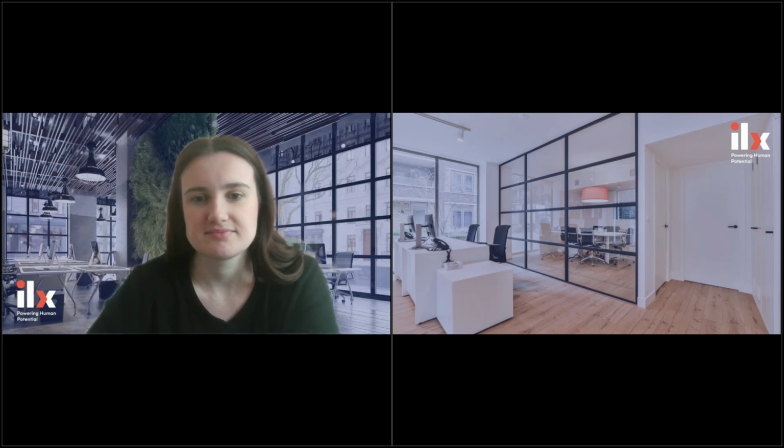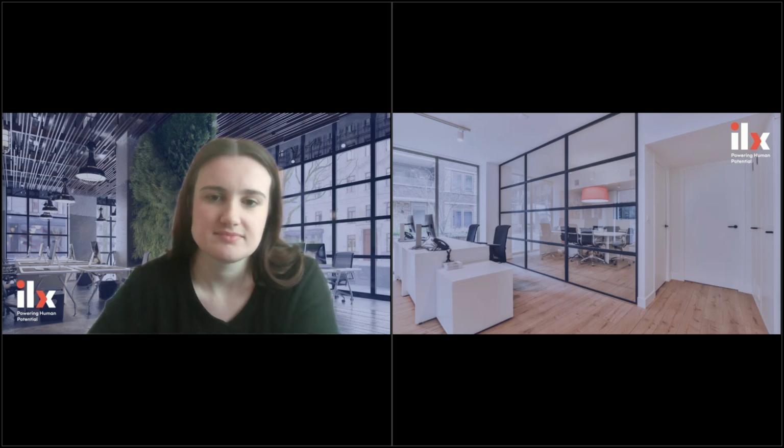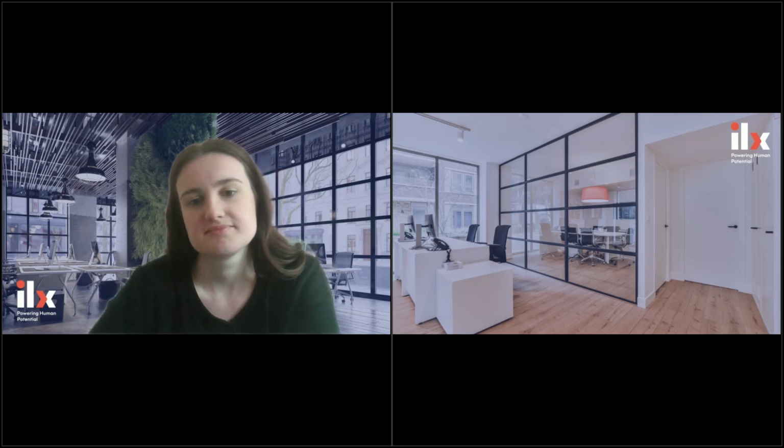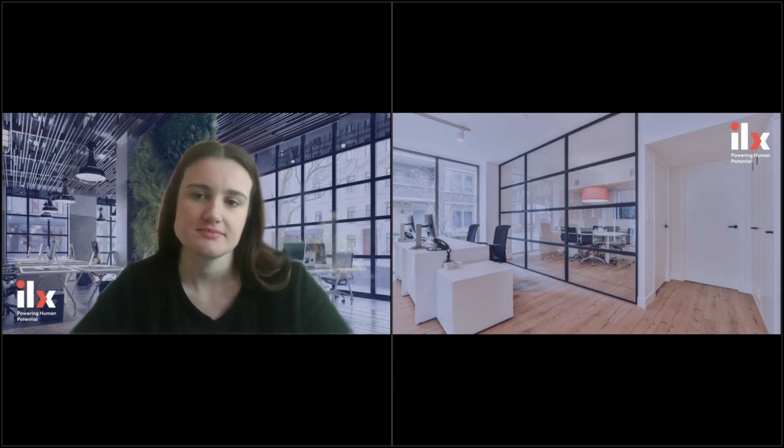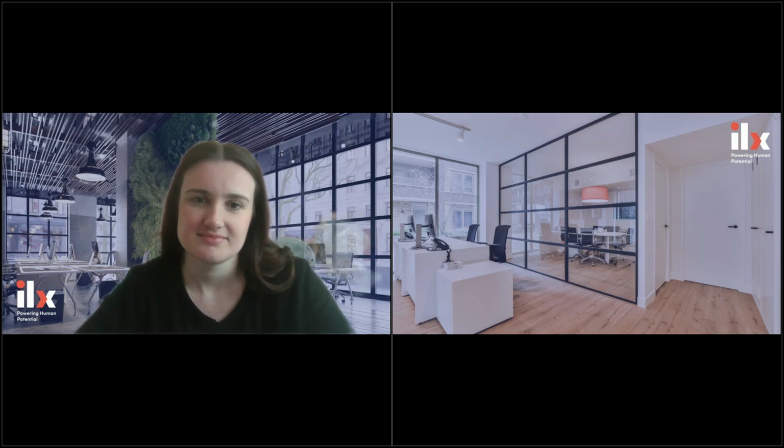What we should also be doing is we'll create a project plan, a delivery plan. The project manager creates that delivery plan. Both the business case and the delivery plan, within reason, should have elements of visibility and transparency through the project. The people in the project should understand the benefits we want to achieve and see the bigger picture. So again, you create projects at different levels. Project level, what we call tranche level, and then moving down to that shorter planning horizon at sprint level. The reason we're doing this has to be understood at each level. So the business case and delivery plan have to have the right degree of visibility.